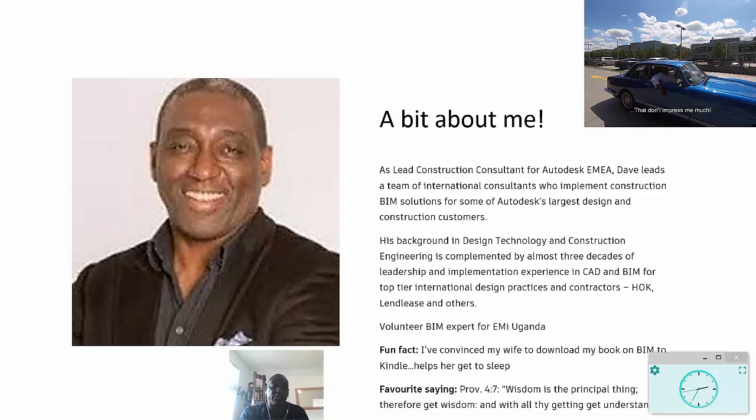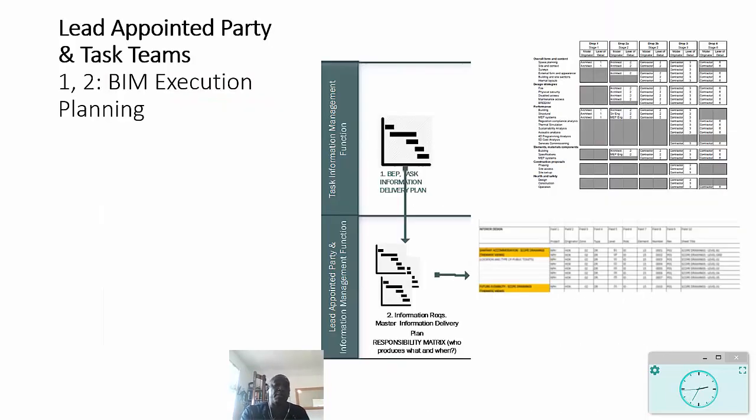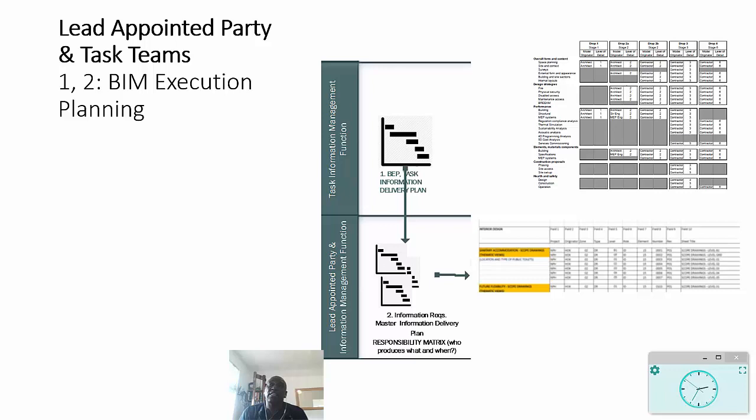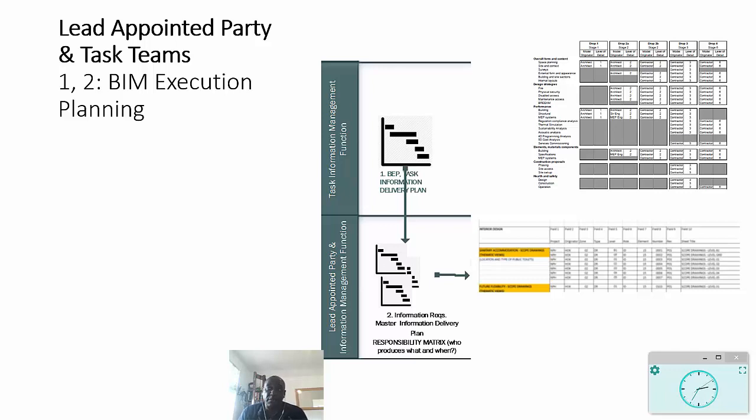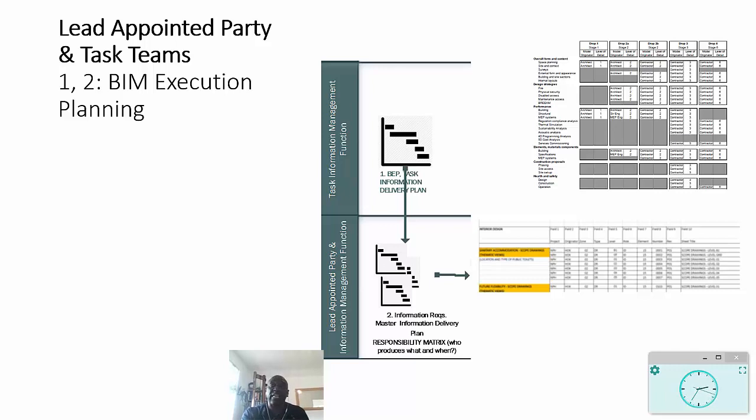Let's get into the meat of this. The main thing to think about are the different parties that are involved in this process. You've got the lead appointed party, which is normally the lead designer - in some cases would be the architect's practice, or it could be engineering-led, or it could be the main contractor. And then you have the task teams which are feeding information into that lead appointed party, which has the main contractual relationship with the appointing party.